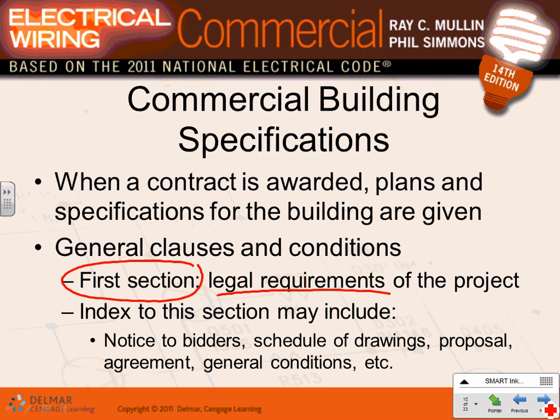Typically it has the notice to bidders, the schedule of drawings, proposal, agreement, and general conditions. This is where you tell them, I'm going to be doing this amount of work for this amount of money, and for this amount of time, right?